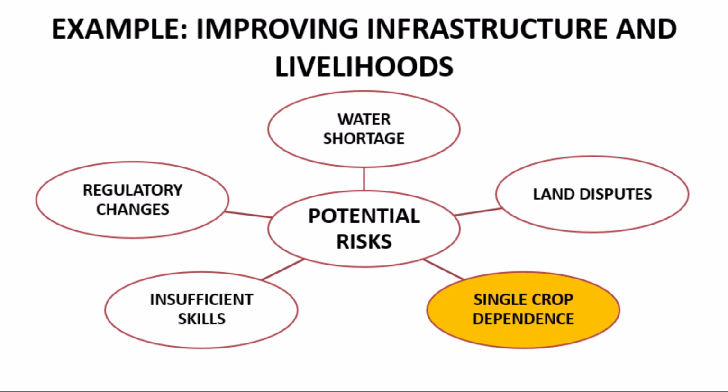Our assessment then is that the livelihood improvement aspect of the project is at risk due to economic dependence on a single crop. This combination of moderate likelihood and high impact again puts this risk as a high priority. We can use qualitative assessments of local farming practices and quantitative analysis of market trends to guide our efforts to diversify crops and therefore enhance their economic resilience.